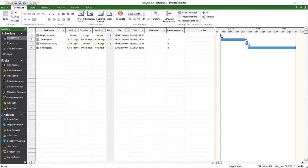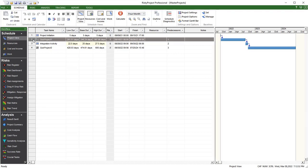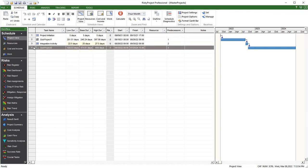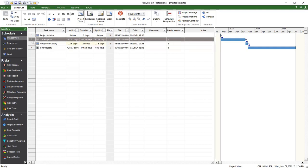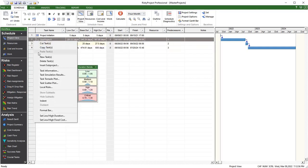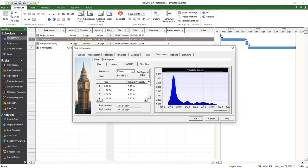Summary Projects. You can now create a summary project schedule using the simulation results of multiple subprojects. In these summary projects, the statistical analysis of one or more subprojects are inserted as tasks into a larger summary project schedule.